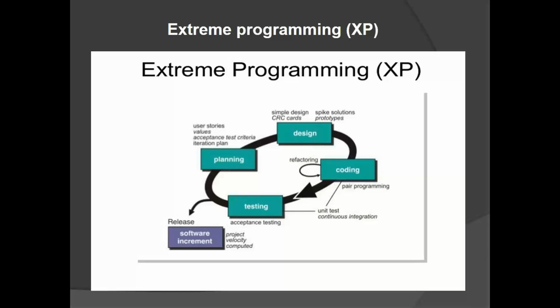Here we are going to represent each and every requirement in the form of a story, which is nothing but a user story, which has to be prioritized. That means we will take each requirement and explain it in the form of a story. For example, if login is there, we will explain this login functionality in the form of a story. How? We will say, okay, if user is going to enter his user ID and password and click on login button, the system will allow the user to enter into application in this way.